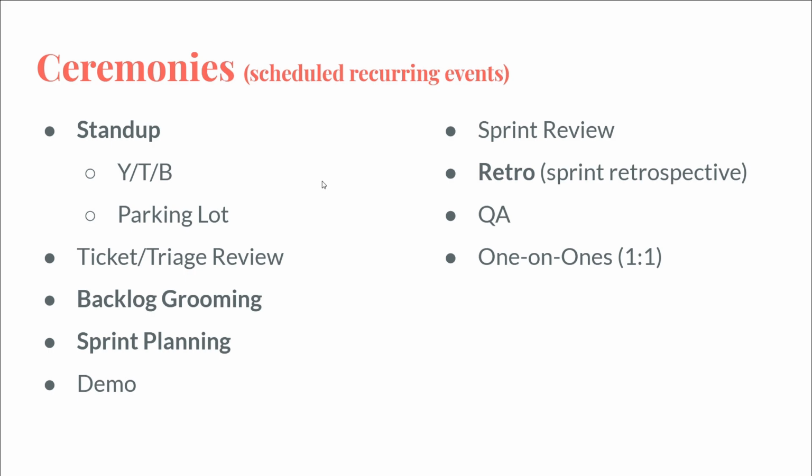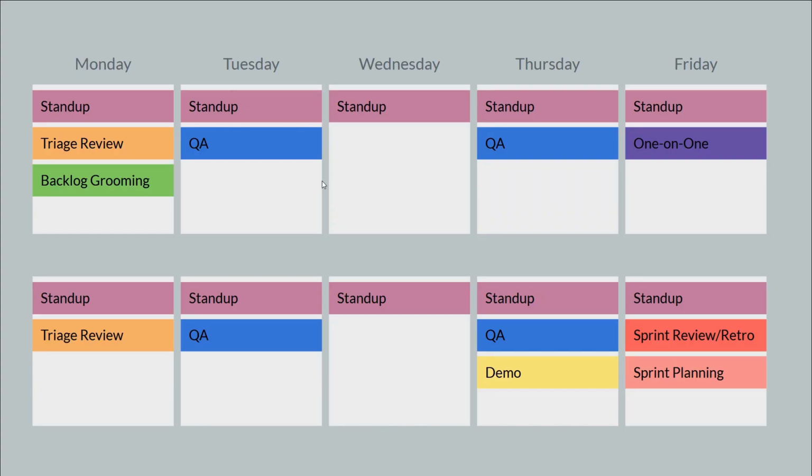So let's look at what this looks like. Here we have two different weeks. We've got this first week, Monday through Friday, and the second week, Monday through Friday. You'll notice that stand-up happens every day. It's the first thing that happens. Stand-up is usually like 15 minutes long.